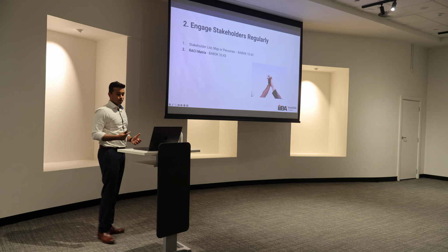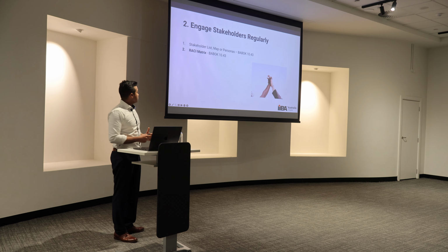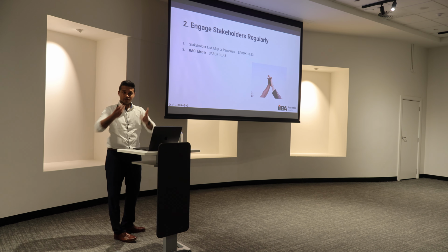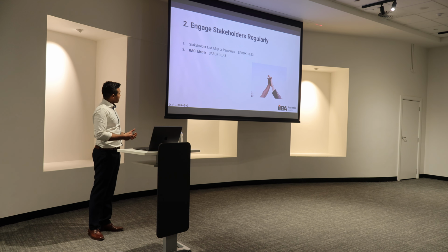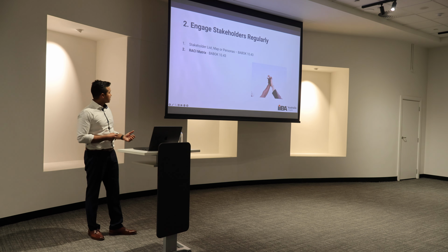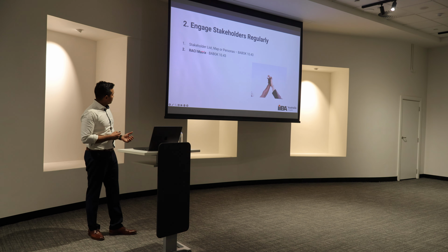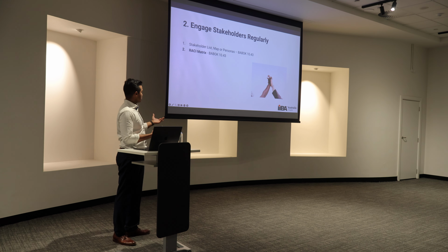A very important one that he brought, engaging stakeholders early and regularly, because otherwise you end up where you were telling me as well. Everyone goes through it. There's a lot of techniques, but I find that just a RESUME matrix works as well in most cases because it kind of covers a bit of these as well. It tells you who is responsible, who needs to be consulted, it kind of tells you what the relationships are. It kind of works well for me.